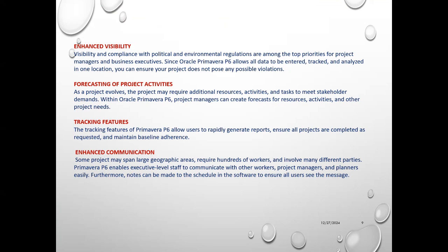Okay, say I am in the 6th month of my project. What we plan to do at the end of the 6 months, this is what we plan to do. This is the planned progress. Let's say 30% of the progress, whereas we are actually at 27%. So there is a 3% delay. So where does this delay come from? You can easily track where the delay is coming from. So the delay is coming basically from the design of one of the work packages. That is a critical work package. That critical delay is actually pushing the project by 3% negative variance.